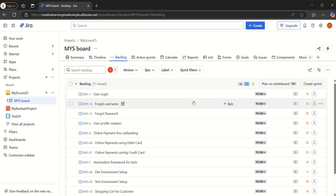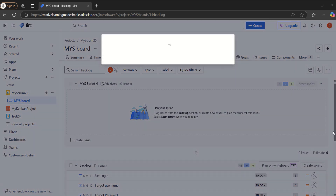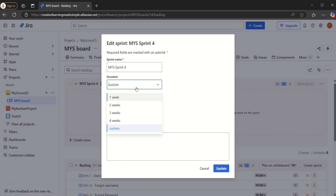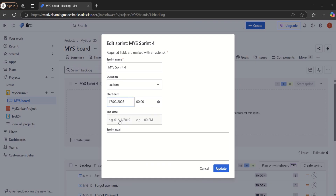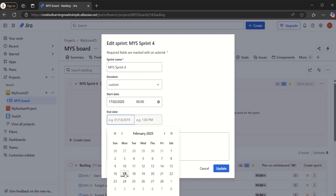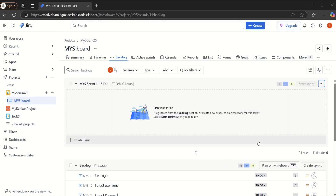Right now there are no sprints in this board. We have a button here which says 'Create a Sprint,' so we will create a simple sprint. It automatically says 'My Sprint 4,' but I'll click 'Edit Sprint' and make it custom. Today is the 17th and let's say it is ending on the 28th. We will name this 'My Sprint One.' Then we can create another sprint.